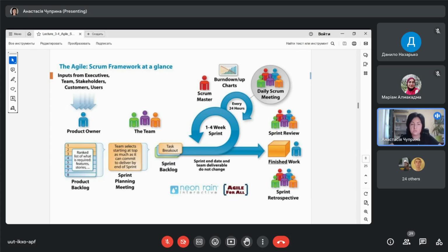You input in the sprint backlog document features which I ask you to develop in the sprint. Again, you make a breakout of the tasks. You estimate each task. You estimate who will be responsible for which task. Then you calculate total amount of hours. Then next day you start sprint number 2. You work 2 weeks. Then we have sprint review meeting where you present me second sprint. Again, I give some feedback, and then I give you new functions to the sprint number 3. So it's like a loop, the same steps during each sprint.